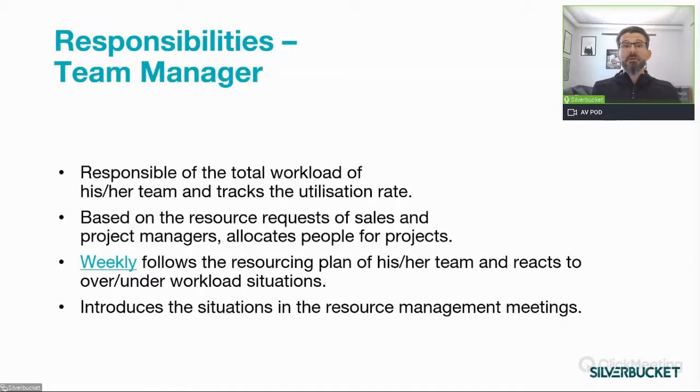And the team managers should also follow the detailed allocations of the team, typically on weekly basis, checking and resolving possible overload and underload situations of the team members. The team managers also participate resource management meetings and introduce their situation there. I will discuss the role of the resource management meetings next.